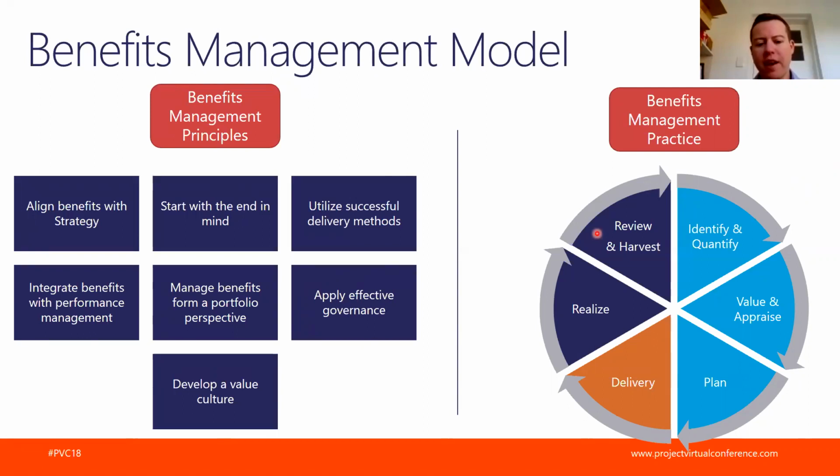When you have done that, you are entering into a planning phase, and the planning phase at the benefits management level can be linked to the planning phase at a project level. So when you plan your benefits, you will see that some of them will be realized during the delivery, but most of them will be realized after the actual project has been delivered. So take an implementation of a project management system, for example. It's an easy one for me.